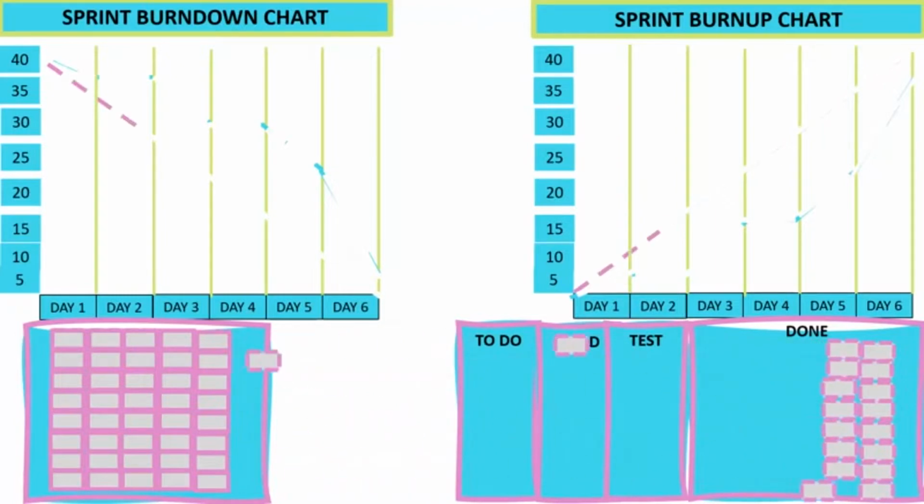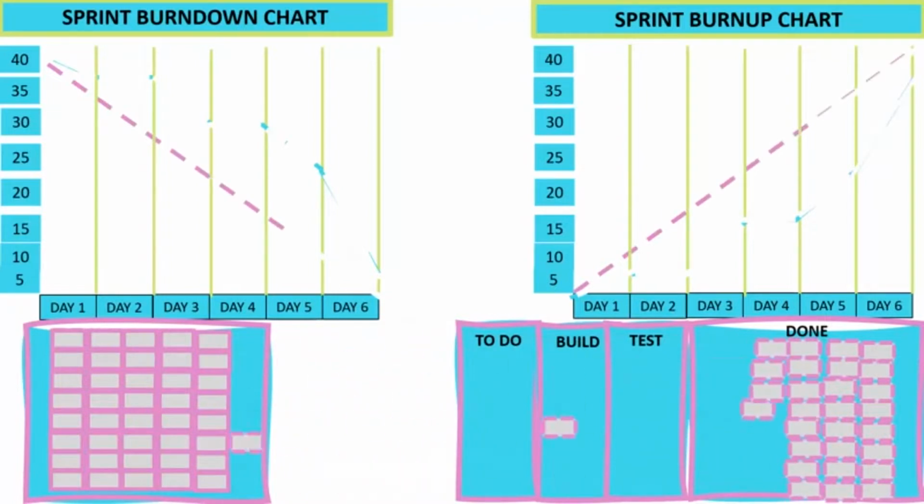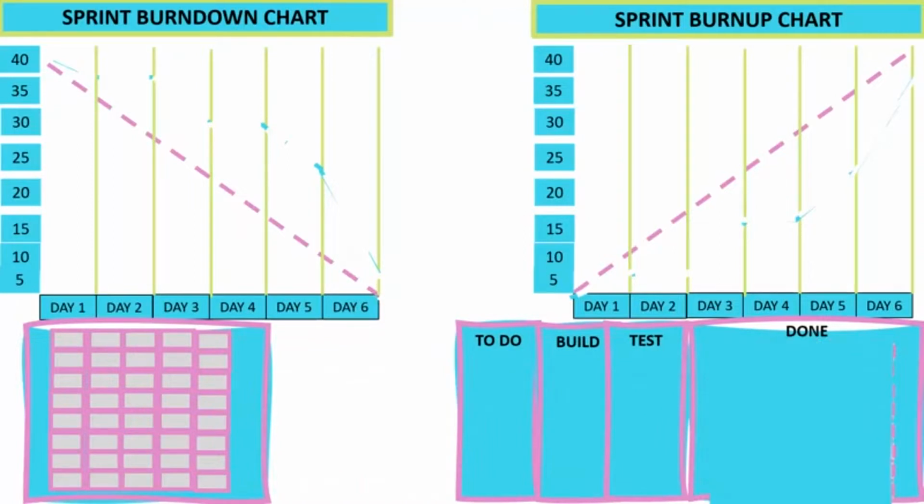As an example, if the team averages 50 story points per iteration, and the team estimates there are about another 500 points remaining, the team estimates it has about 10 iterations remaining. If the team averages a cycle time of 3 days per story and there are 30 remaining stories, the team would have 90 business days remaining, approximately 4 to 5 months.